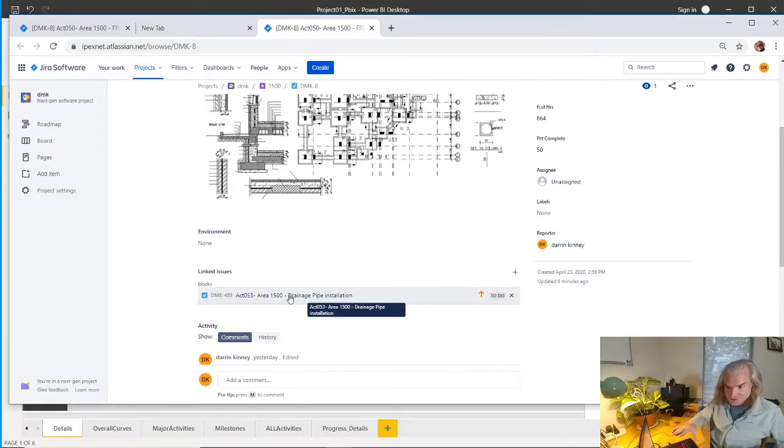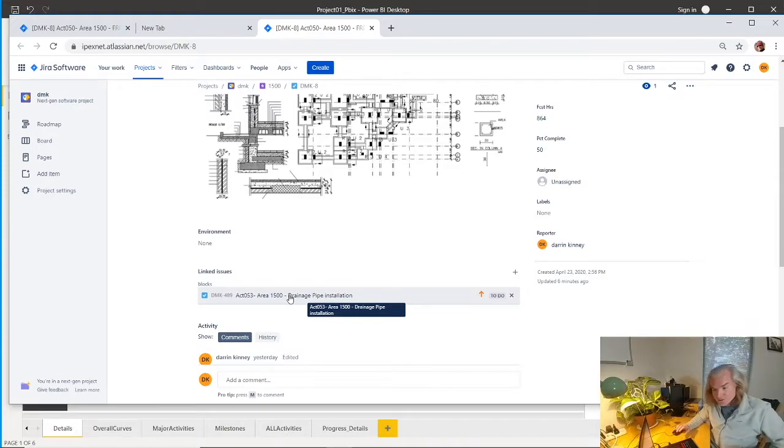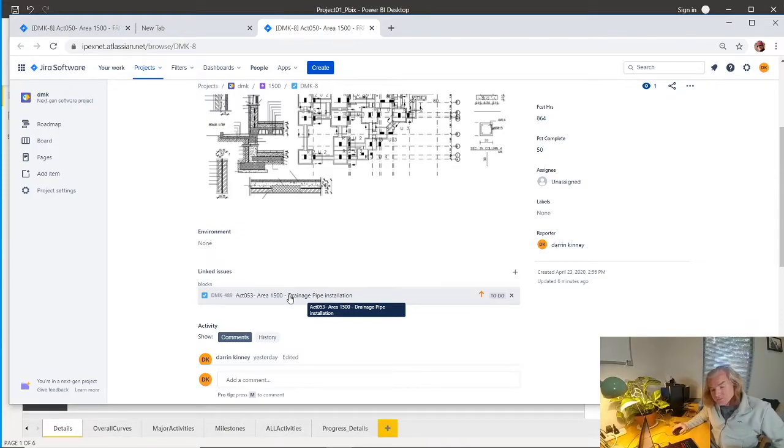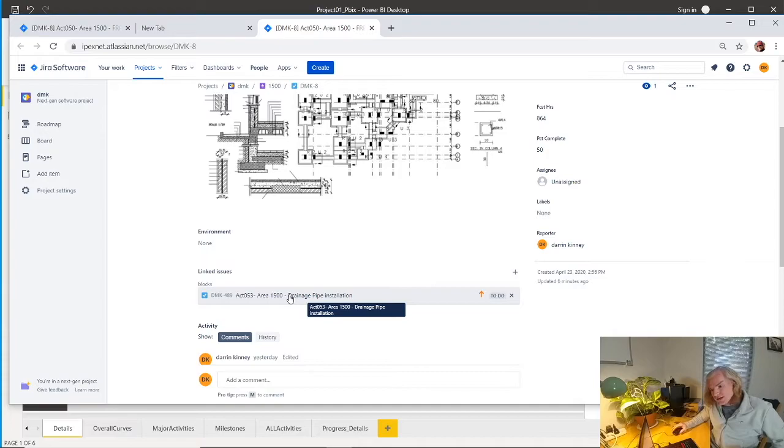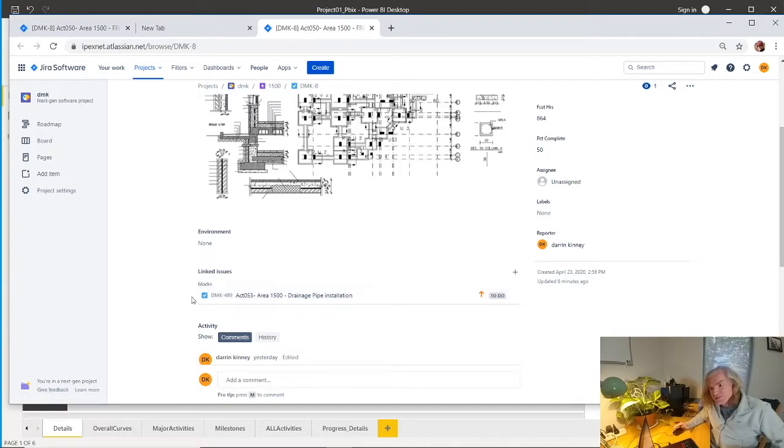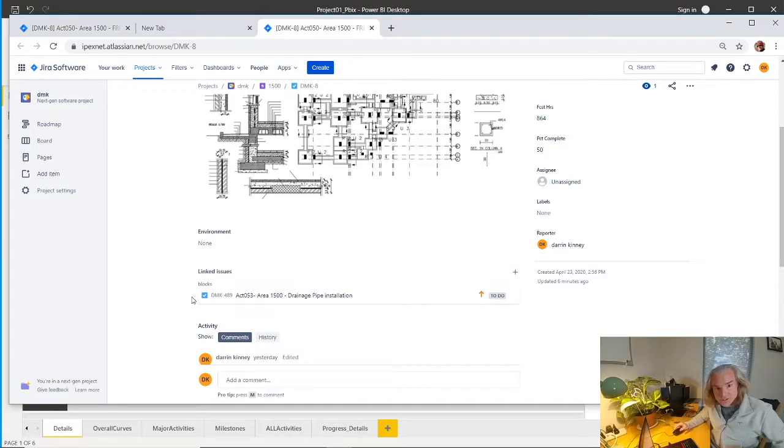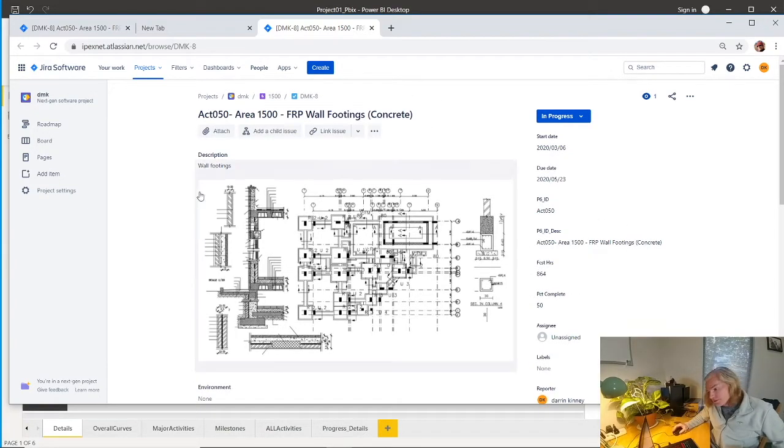There's some Gantt charts you can do within Jira. I don't entirely recommend those because I think you should have a schedule, and your Gantt CPM information should be in your schedule. However, not many people open schedules, edit schedules, or know where the information is coming from. And that's what Jira can do.